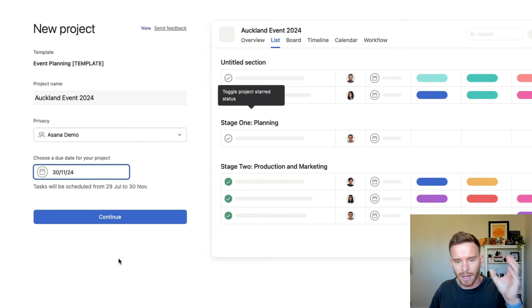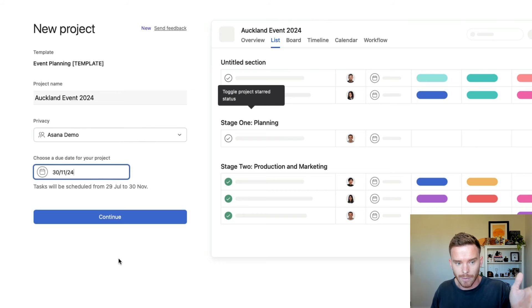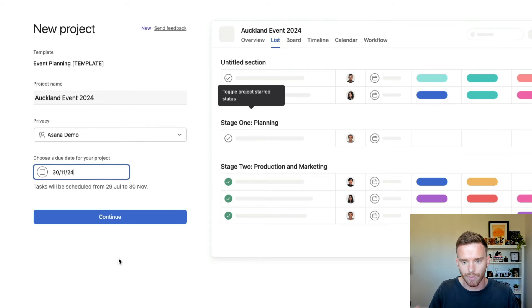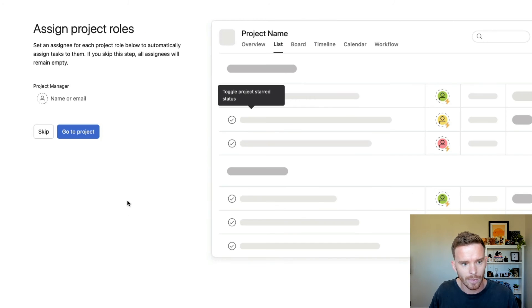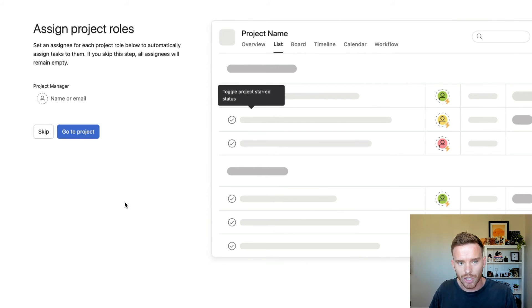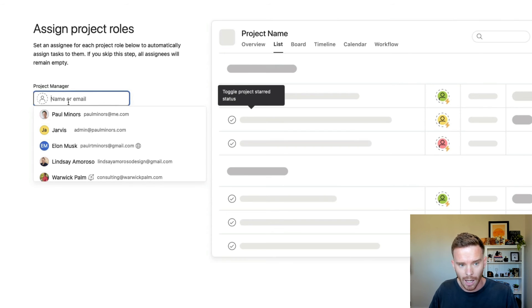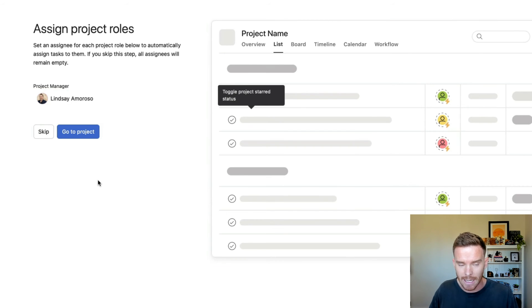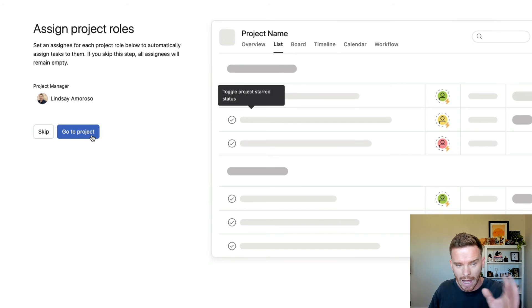So because I had my event day task as day zero, that task is going to be due on this day. I'm working backwards from the event day. So let's click continue. And it's also going to ask me to fill in the project roles. So I have my project manager role, I'm going to say this is Lindsay on my team. She's my project manager responsible for this particular project. So I've allocated her to that role.